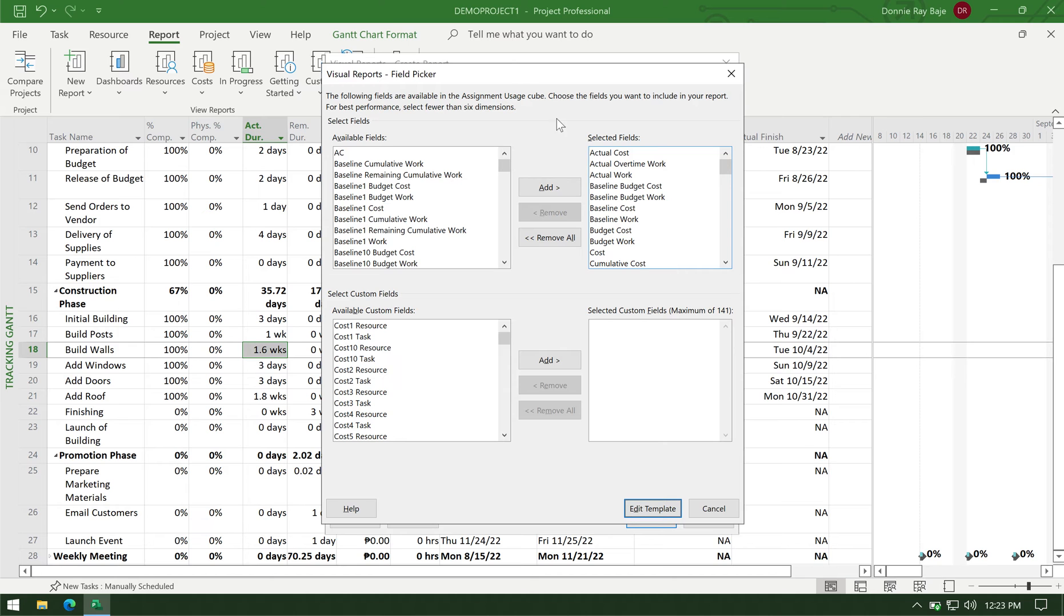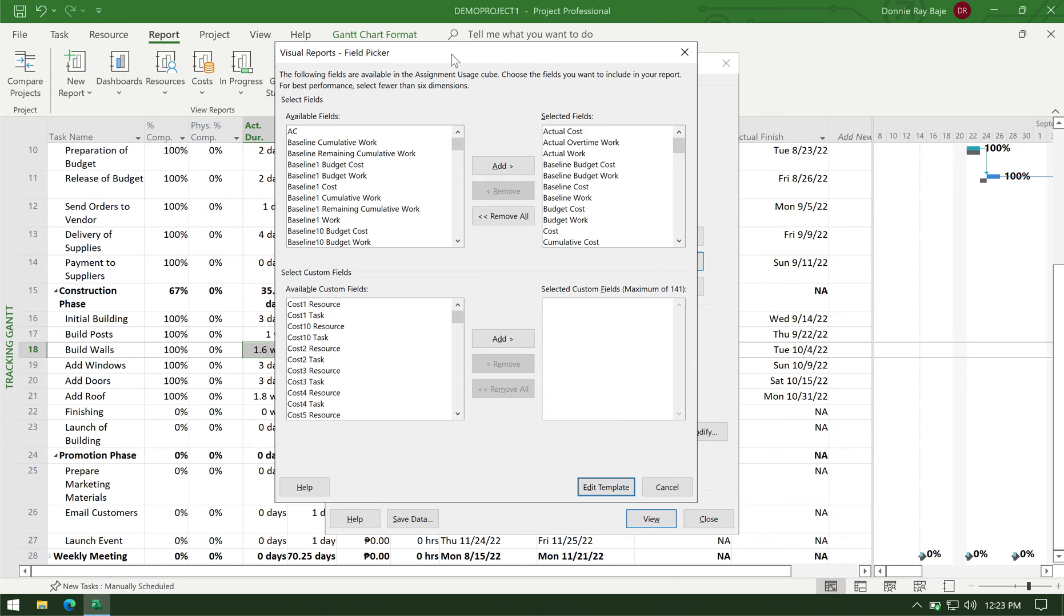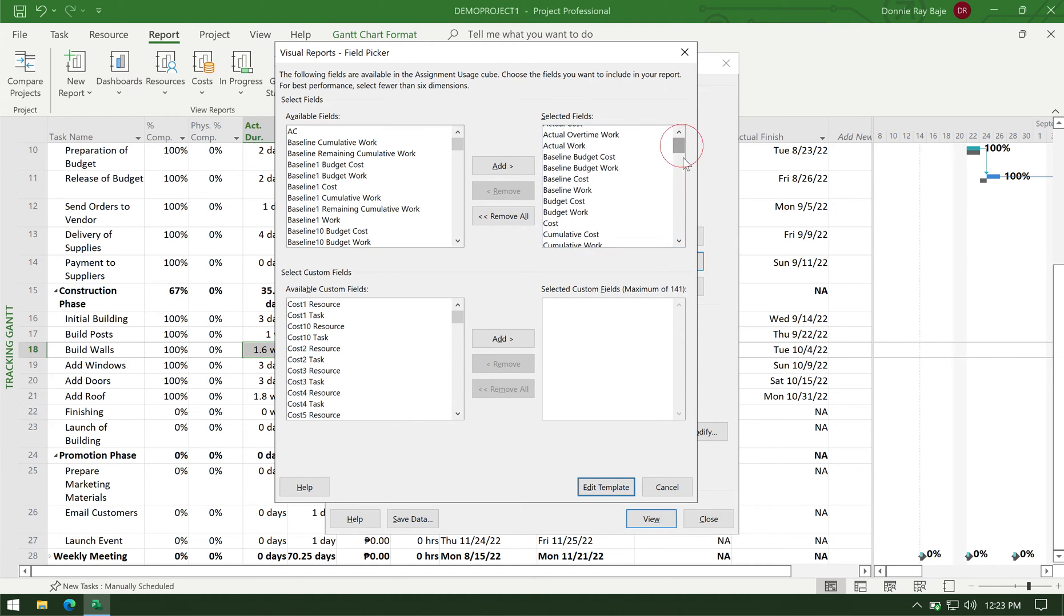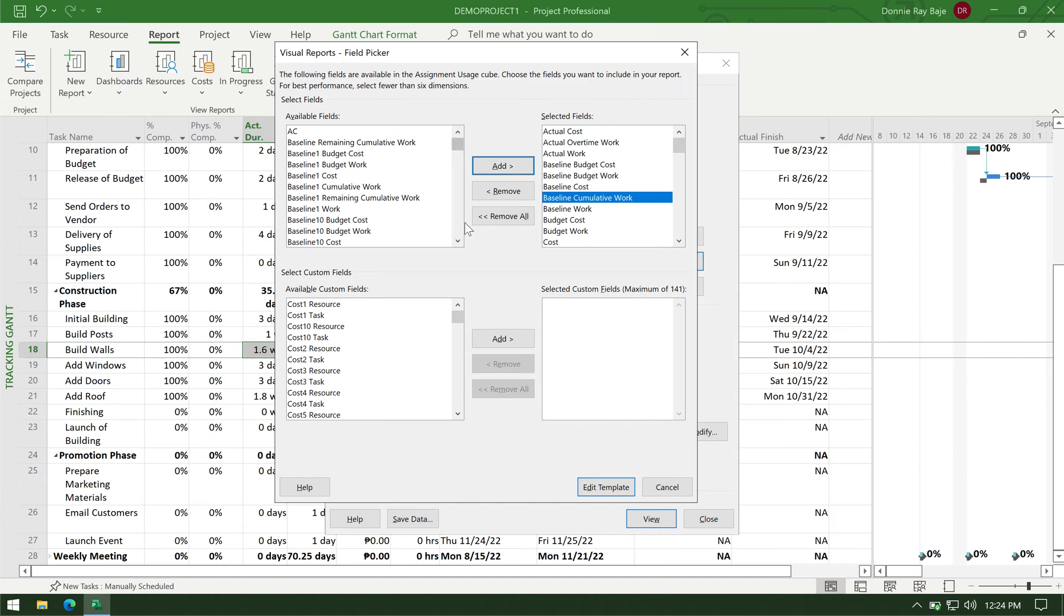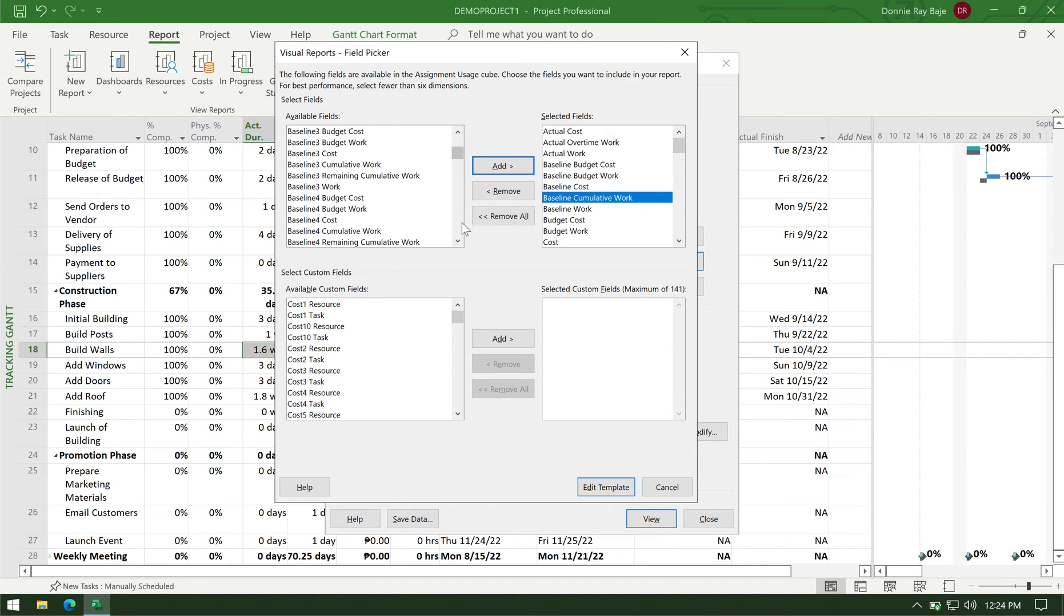So here in the edit template, I could add more fields or remove fields from the report that will be produced. So actually, there will be a lot of fields here that are already added for you. But what you really need is still not yet added. So I need the baseline cumulative work. So click add. And also the cumulative actual work. So it's alphabetical. So you have to go here and then add that as well.